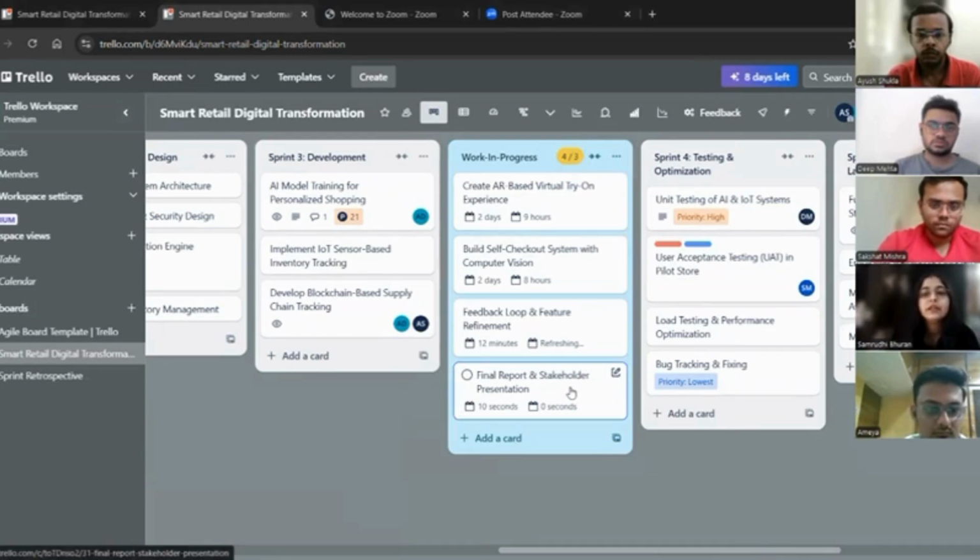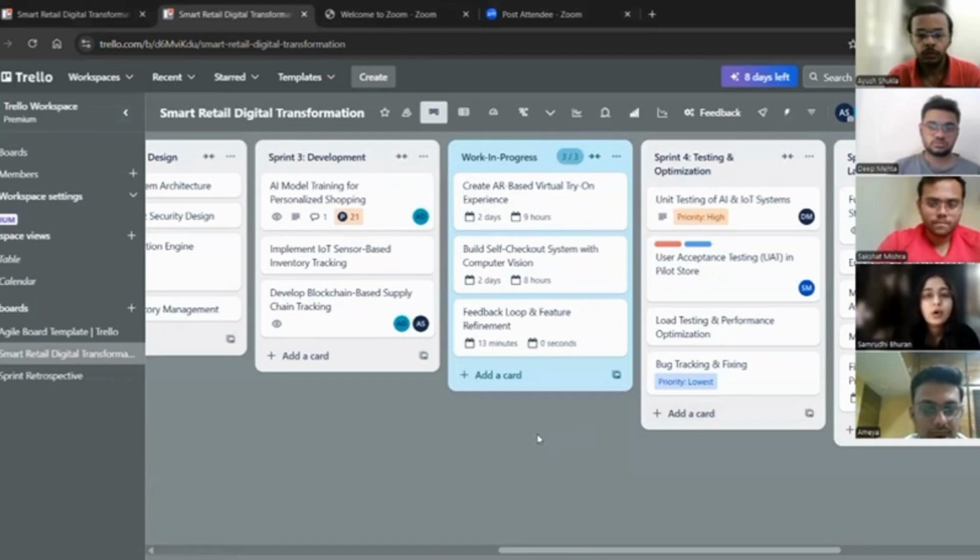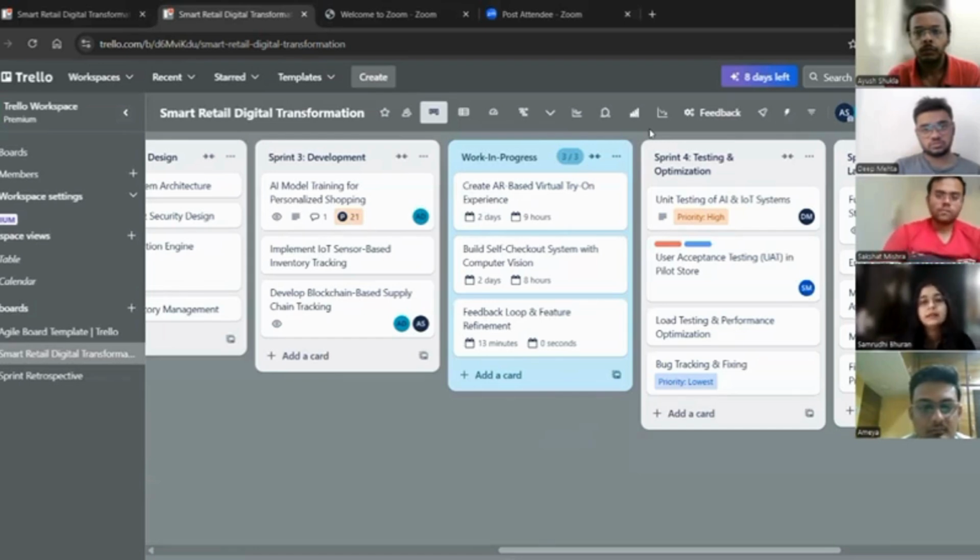The key features are it reduces context switching, helping team members to stay focused. Then it also helps to identify bottlenecks, so we can spot and fix the issues quickly. It also ensures a steady flow of progress, preventing work from piling up. So how can we manage WIP effectively? We can use Kanban boards to visually track the tasks and set up WIP limits. Also, hold daily stand-up meetings to check the progress of tasks and identify the blockers. We can also focus on high impact tasks and make sure the team is always working on what matters the most.